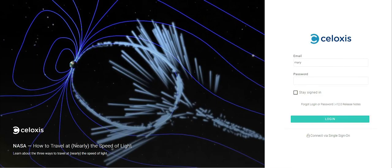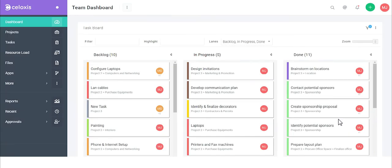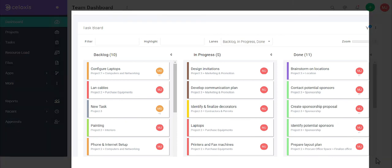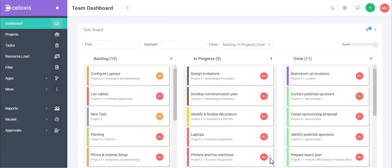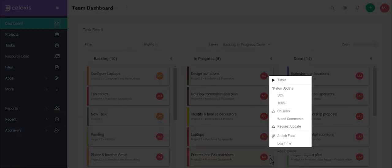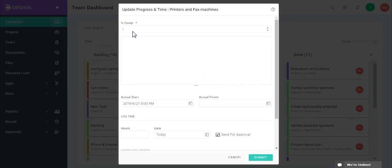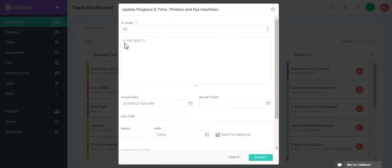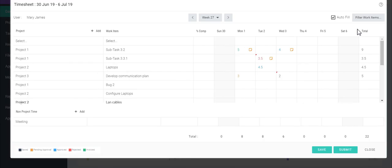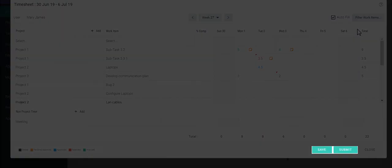Let's now switch over to a team member's role. As shown earlier, the dashboard has been set up and configured by the admin. Here I can see my tasks, to-dos, discussions, and bugs all at once. I can just hover over a task to bring up its three-line menu — here I can start a timer or quickly report progress on it. I can also attach documents. Let's add an update to this task: I can enter the current status of my task, expressed as a percentage of its duration, and a brief comment. I can also enter time and send it for approval to my manager. Teams can also use the weekly timesheet to report time divided on project and non-project activities. I can save these entries as a draft for later submission, or directly send it all for approval.